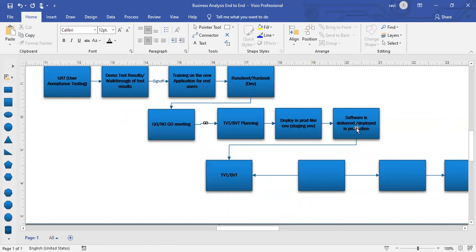In these steps, after the software is deployed, you normally deploy the software during non-business or non-working hours. For example, you deploy it on Saturday, or if it's a net banking application, you deploy somewhere around 12 a.m. or 1 a.m. or 2 a.m., when you don't have much traffic. When we deploy this, it is a big risk to wait till next day morning, when some users come and then what if it's not working? You have an issue.